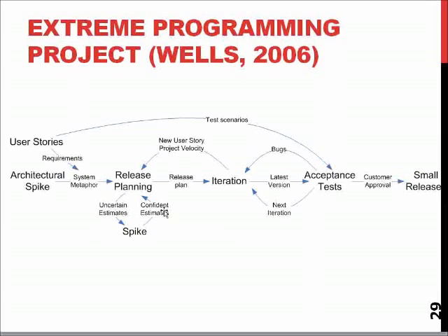And when you are done with one release or one new version, you have the acceptance tests and the customer approval, so you release that version. I'm not releasing anything on, let's say, a monthly cycle or even a weekly cycle. The small release here means that every time you add a new feature and have that feature accepted and approved, that's your new release version of the software.